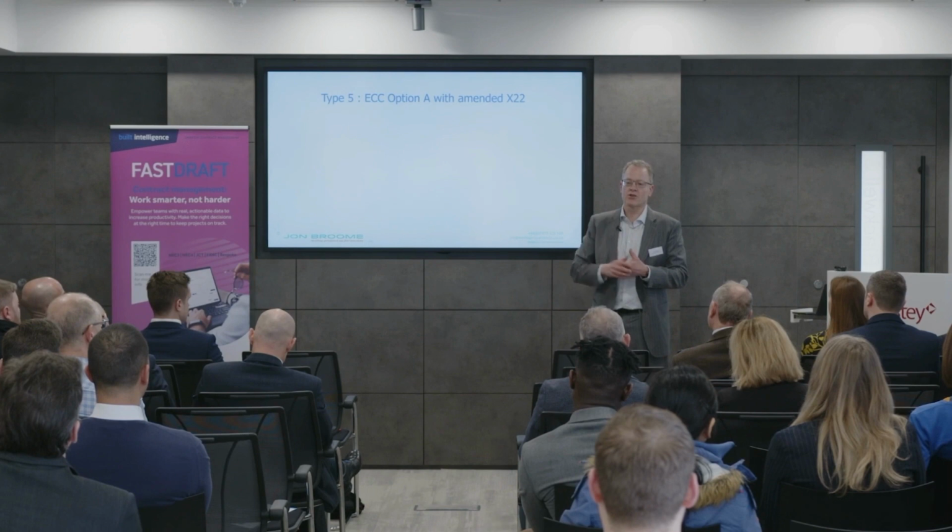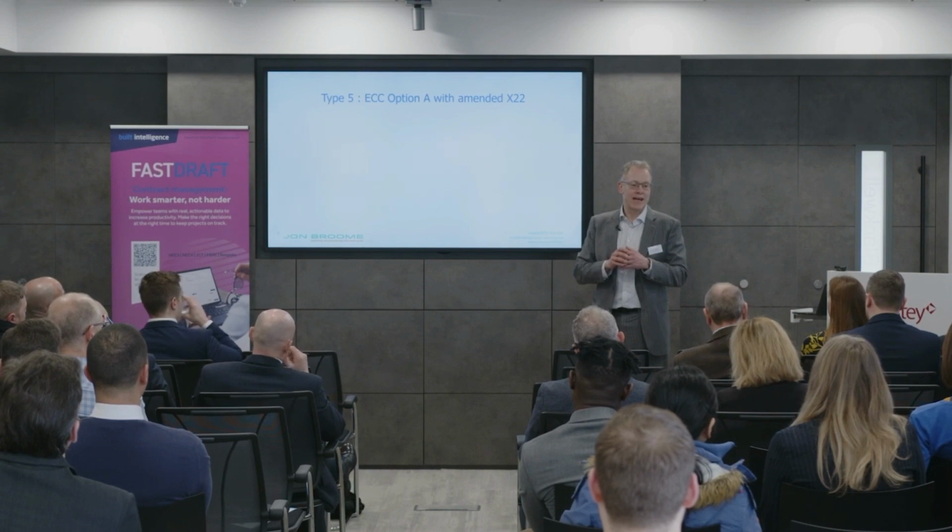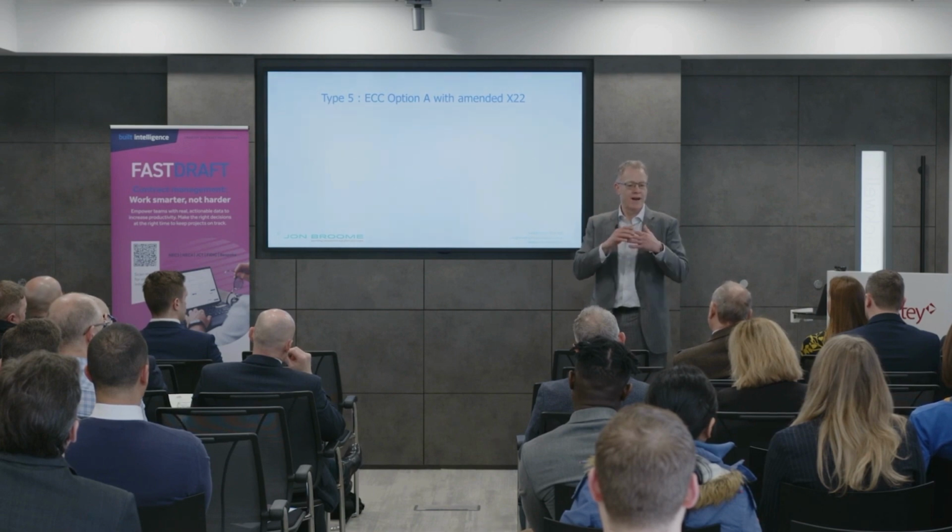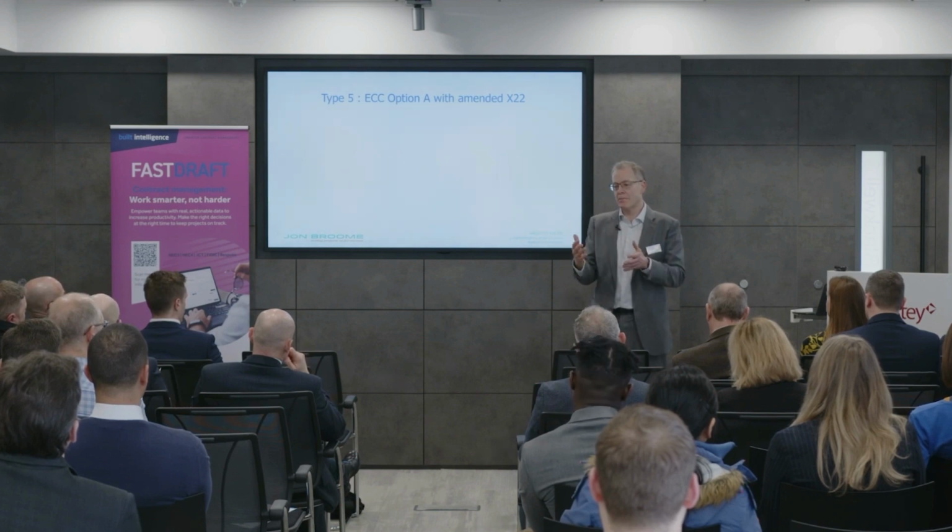And the preferred contractor approach was where big London developers had their favoured contractors, and basically they'd negotiate. They knew what they wanted, they knew roughly what it should cost. They would negotiate with their contractors who they have an ongoing relationship with for a building, and it would be done on a lump sum basis. Yep, that was the preferred contractor approach.